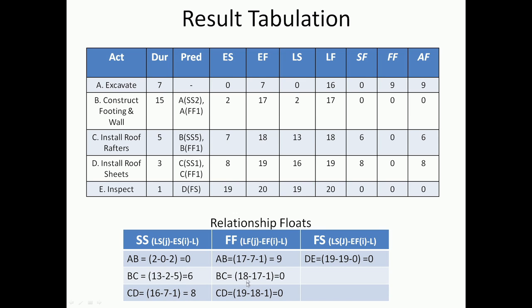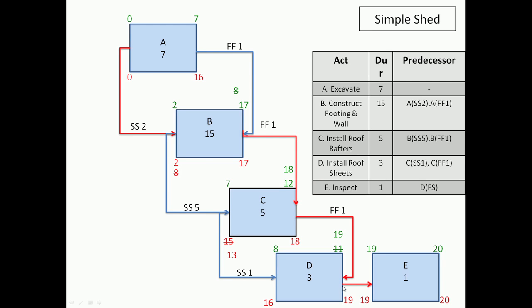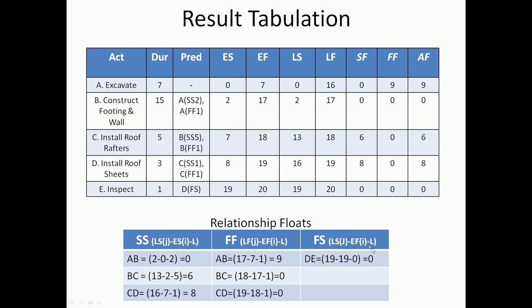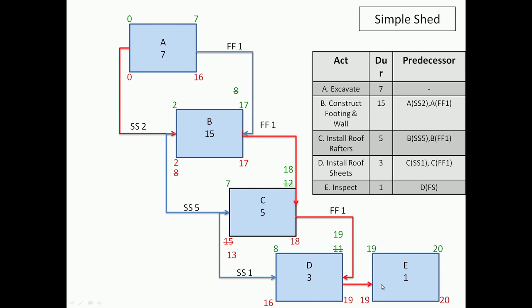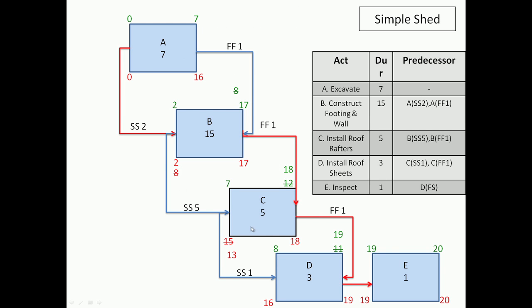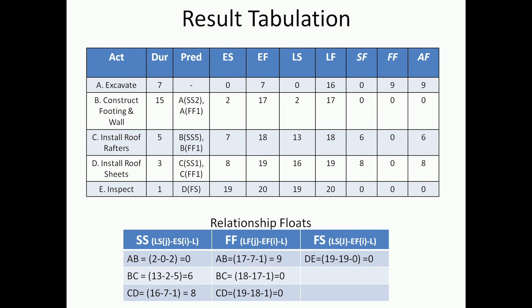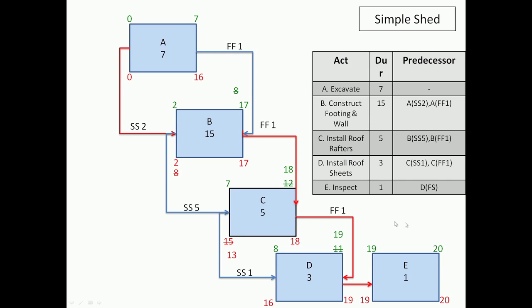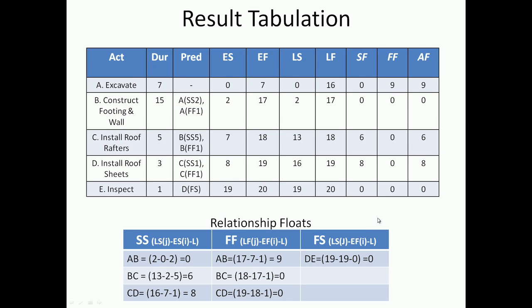Similarly, all the finish-finish floats are represented, and then the finish-start relationship - the only finish-start here - and its float is also represented. When we have no lag it gets to 0. Ideally we would take a network representation like this, do the analysis, and show it in a tabulation. In a larger project that might be easier to read, but from a conceptual standpoint this is fairly illustrative - that is why I have used more of the network for the result discussion rather than just the tabulation.